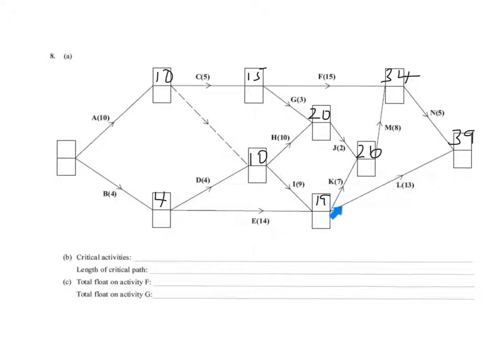You might say, well, hang on, 32 days, 19 and 13, but after 32 days, we still haven't got to this point. So the earliest time we can get there is 39 days. So this is called a forward pass. I forgot to put the naught in at the start, which you always put in. Let's make that a proper 0, that's better. So that's called a forward pass. We've started at the beginning and we've worked through to the end.